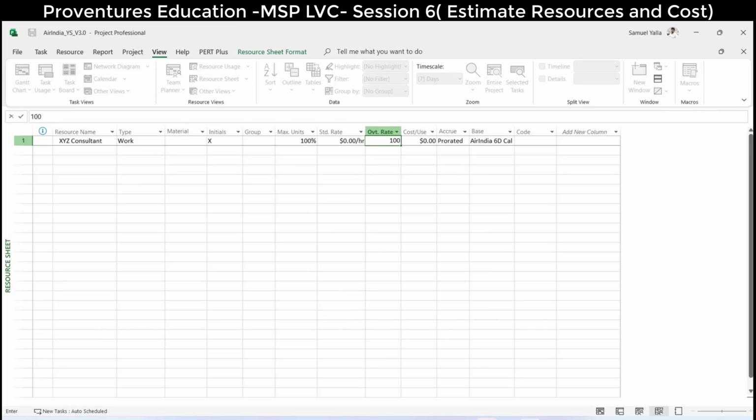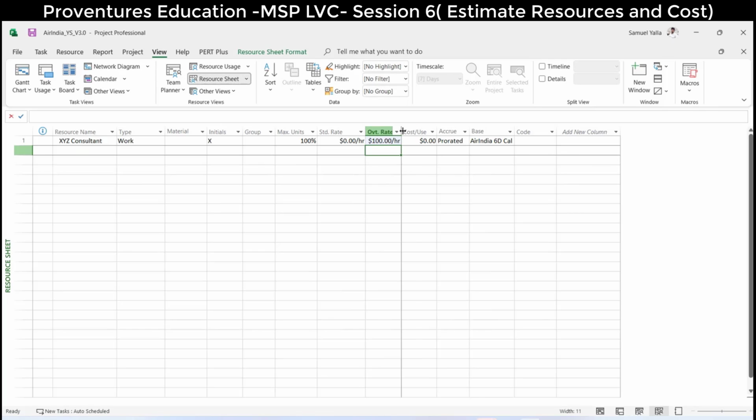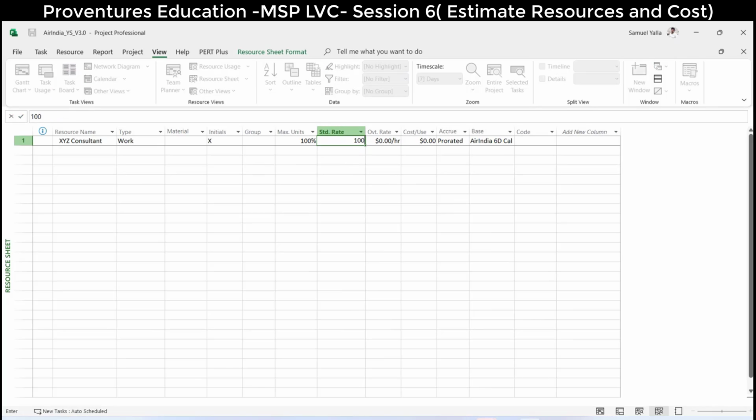Good then. Let's say $100 per hour, standard rate. Oh, sorry, I put it in the overtime rate. Okay, here $100 per hour. His rate is $100 per hour. Tomorrow when you assign him to a task, which is a 1 day activity, tell me per day how many hours he will work? 8 hours. 8 into 100. That is his cost, the cost estimation of that particular activity. So eight hundred dollars per day.